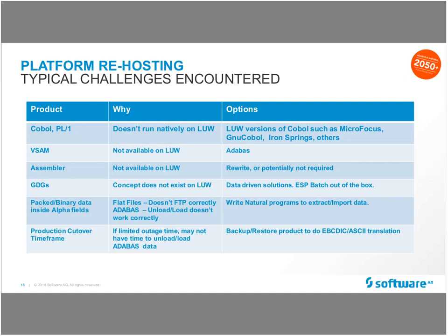The second area, and sometimes it can relate to that, is the production cutover time frame. When we actually do a live production cutover, what you're going to do is shut down your mainframe database. You're going to do an unload of that database. You're going to FTP those files over to your new platform, and you're going to do a compress and load into that new platform. Typically, even with the largest databases that we have out there, it does only take a few hours.